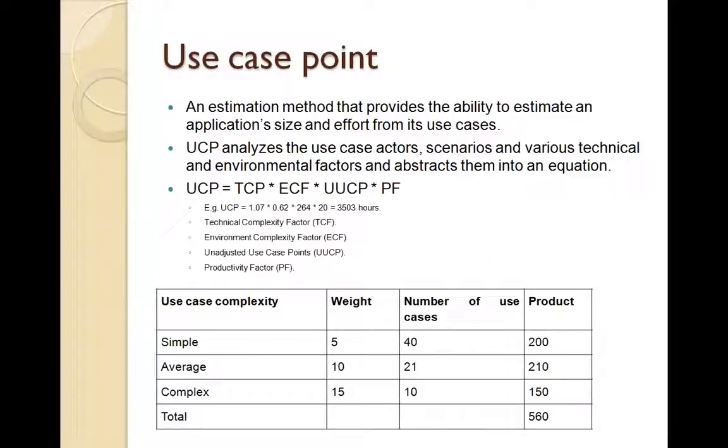The next one is the use case point estimation. This particular estimation method is based on use case modeling or UML modeling, wherein you create use cases for various scenarios, and then you estimate based on the various factors of those use cases. So how complex is that use case? Is it a medium complex, low complex, or a high complex use case? Are there any other factors that are involved with the use case?